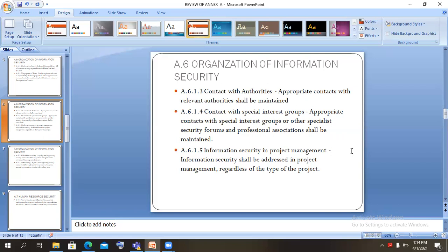So we need to build information security into that project. For example, system development. You don't just go and get a vendor anyhow. There are processes: request for proposal, responding to the request for proposal, assessing the performance of the vendor making presentations. We look at security requirements as we are defining even requirements as per functionality. We are also focusing on security requirements. So what we're saying is, everything you are doing in an organization, you need to look at security. You need to build security controls into your projects. Okay, so that's